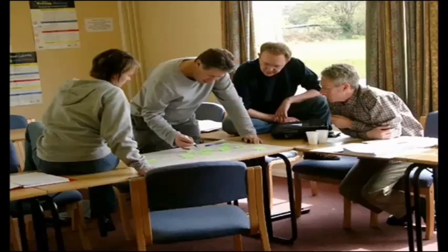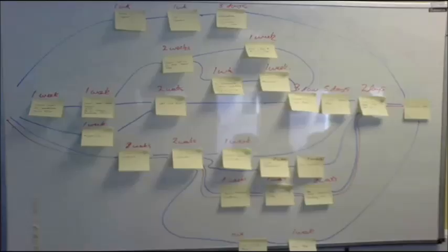In reality, you just put the time on each arrow if it's PERT, or on each box if it's CPM, and just add them up. And it's easy enough to find the longest path. You just add up the longest path. You don't need to put all the times in little boxes. I know that's what computers do, but that doesn't mean that we as humans have to do it when we're adding up our post-it notes.